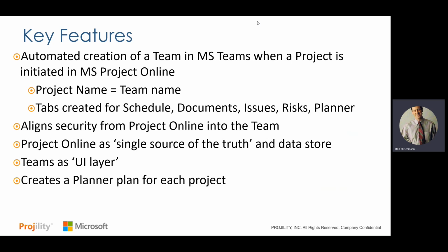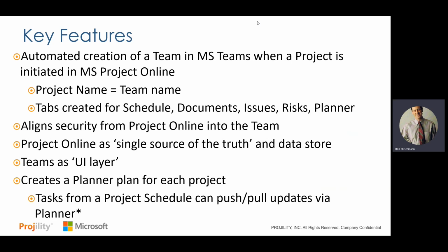And finally, it does create a Planner plan, if you want this option, for each project. What this can be used for is not only action items and meeting minutes and things like that, but also it can synchronize tasks from your project schedule in Microsoft Project that your project manager is building over into a Planner plan and get updates back and forth. It has that two-way integration. This is kind of a nice value-added feature.